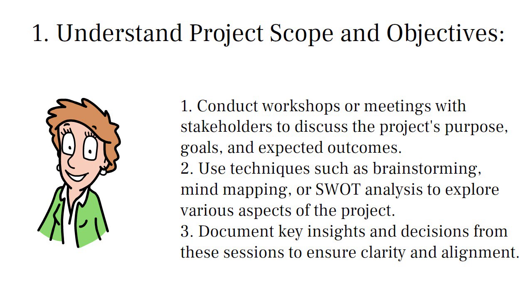What is the entry criteria for this first step? You must identify who the stakeholders are and who the project charter holders are. The exit criteria — meaning when you know you've completed this step — is when you have a clear understanding of your project goals and the scope is documented in the project charter. Without this, you must not move on to the next step.